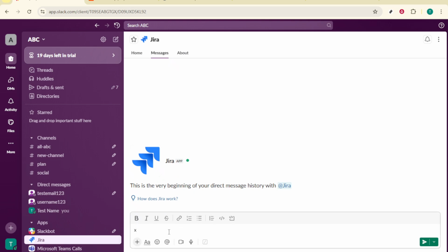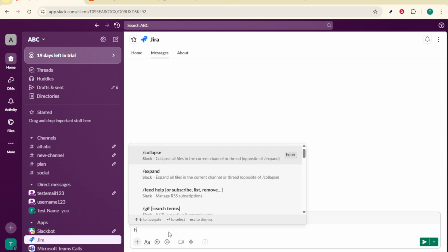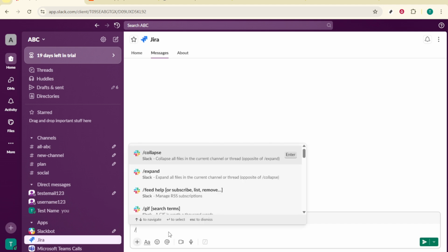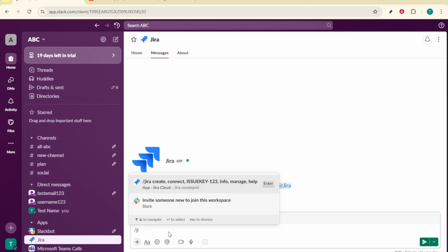A few tips as you go. Use a concise summary that someone scanning a backlog will understand at a glance. In the description, include why this matters, what needs to be done, and any relevant links. Choose the correct issue type so reporting and workflows run smoothly. If optional fields like priority or labels appear, set them consistently with your team's standards.